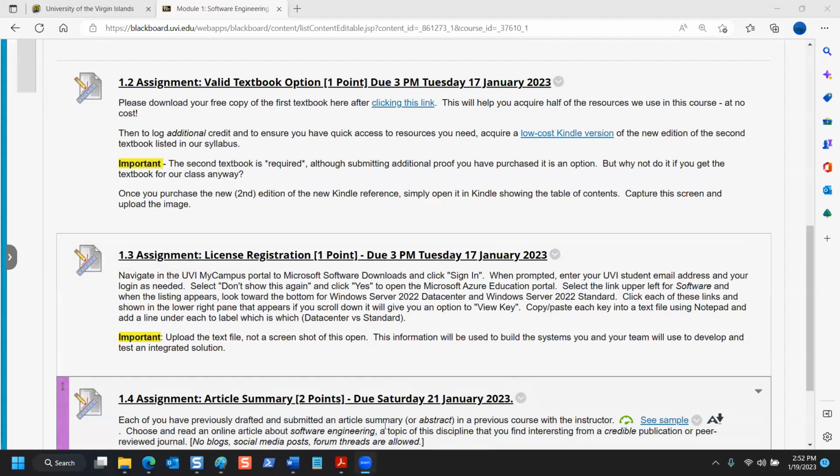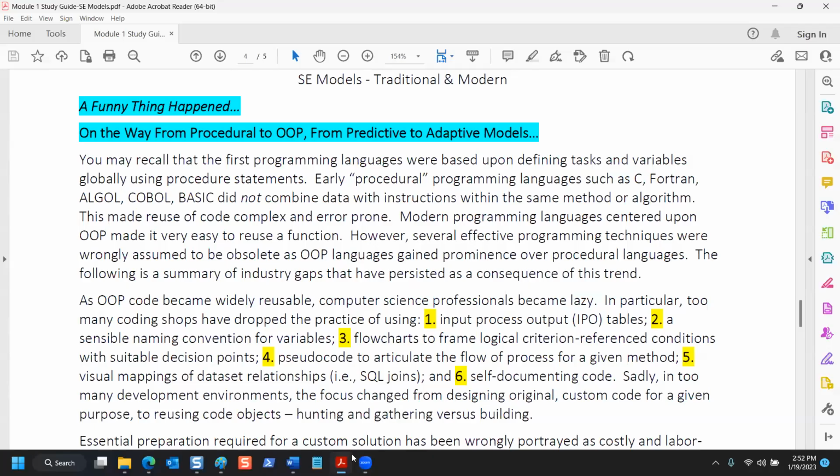Half answered correctly, half answered incorrectly. For cases where you lack a strong project manager and you're dealing with team members who are relatively inexperienced, the planning and documentation, or P&D, software engineering models are your best choice. That's what we know from 30 years of train wrecks.